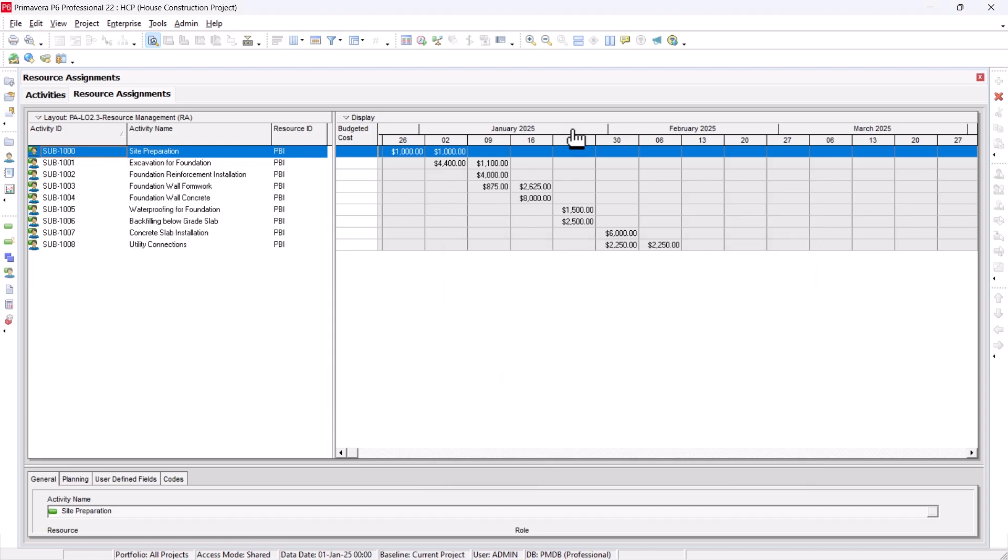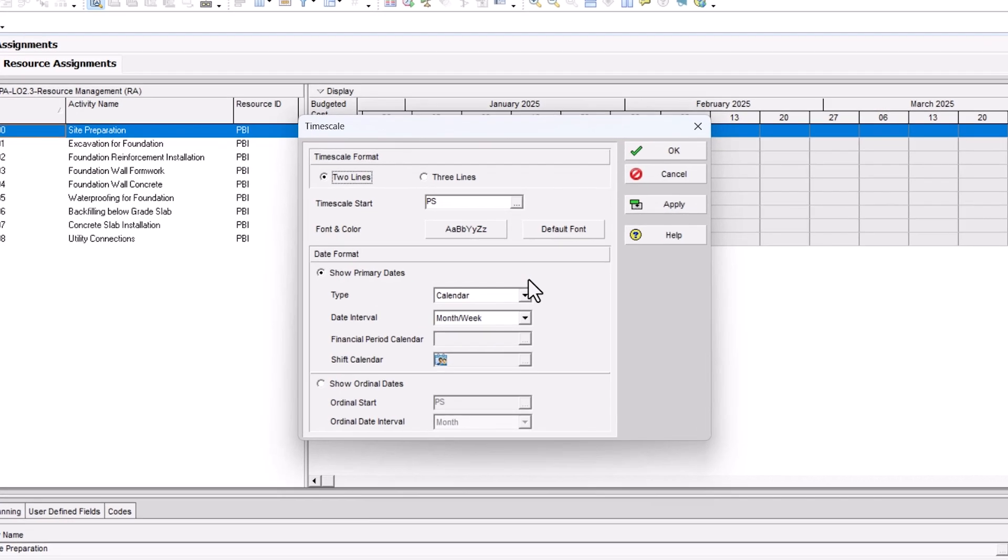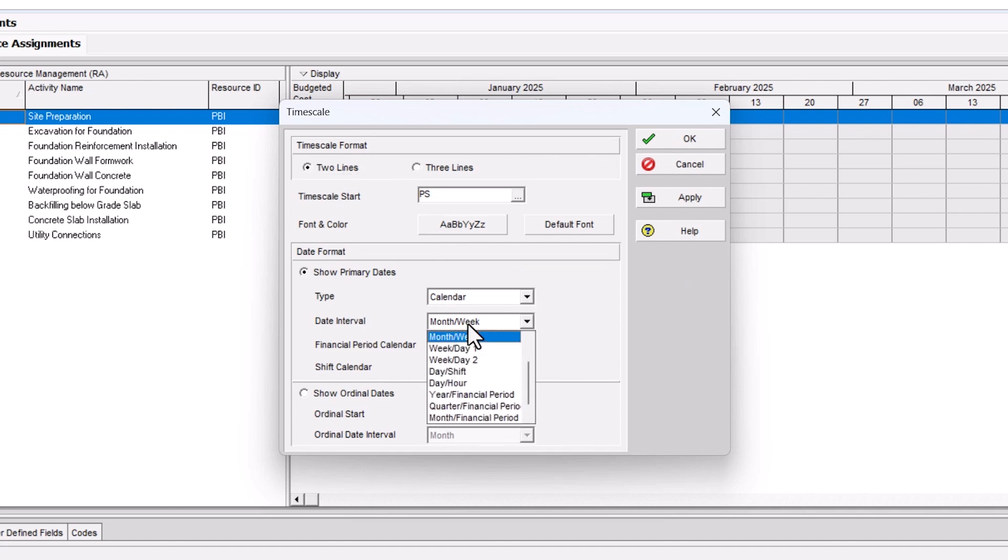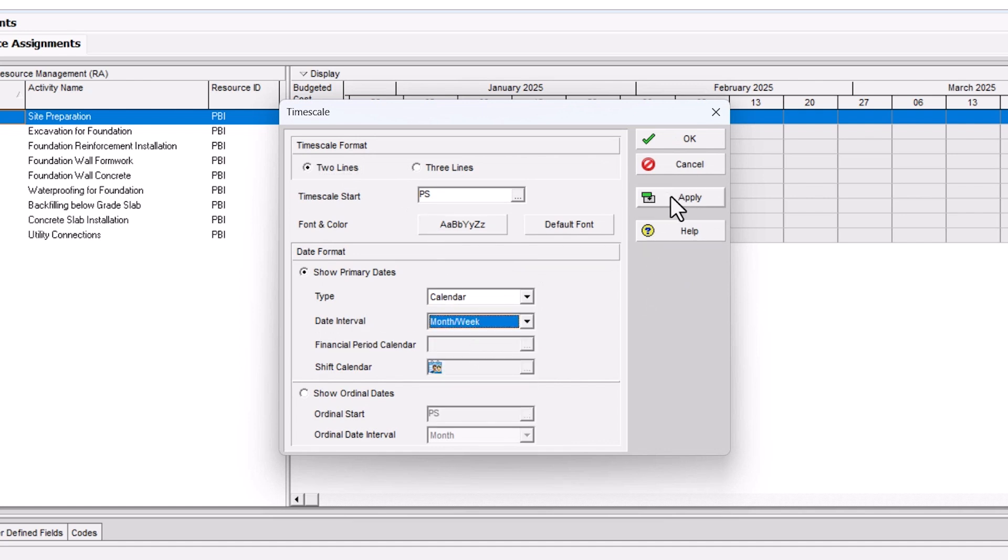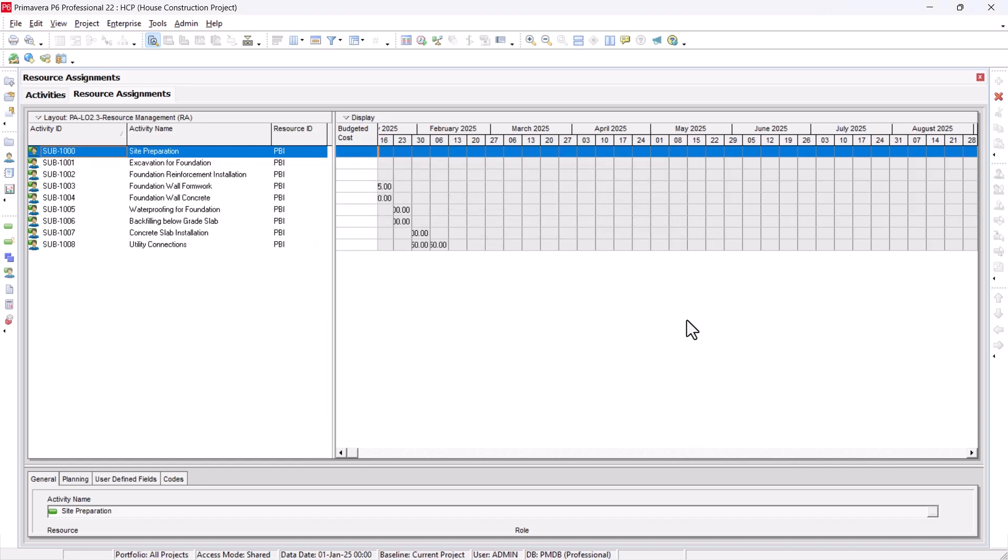Also, the timescale I have set to weekly because I want the cash flow weekly. You can set it up to monthly as well based on your project. So I'll right click here under the timescale. We can see here we have date interval which is month and week. That is what we want. Hit apply, OK.